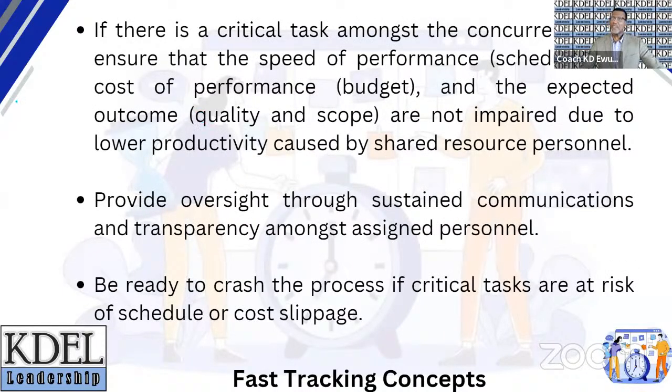How do we crash the process? We begin by first analyzing and estimating the probable effects of applying additional resources to the project. We should be mindful that additional resources cost money. This means that crashing is definitely more expensive, but does shorten the task duration time.